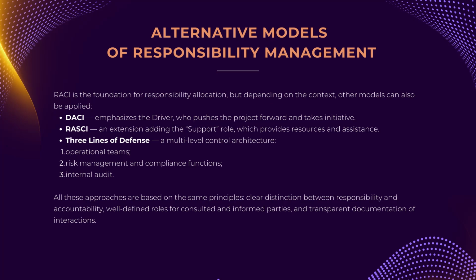First, DACI. The key difference is that instead of multiple responsible parties there is a single driver, the person who not only executes tasks, but actively propels the entire process forward. This is especially valuable in innovative AI projects with high uncertainty where someone must take initiative in decision-making. Second, RASCI, which extends the base model by adding a support role. This role is critical in resource-intensive AI projects where someone must provide compute, data access, or legal support without participating in technical decisions. The third approach differs fundamentally.